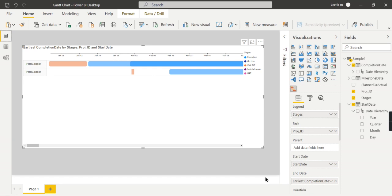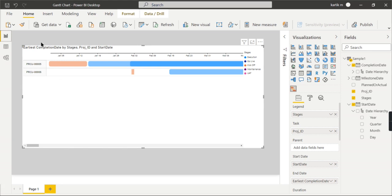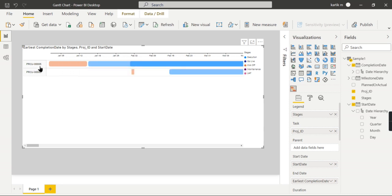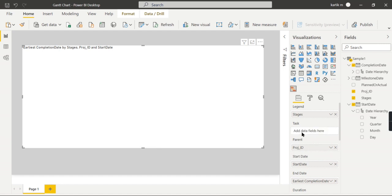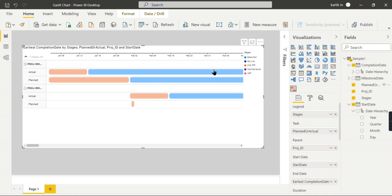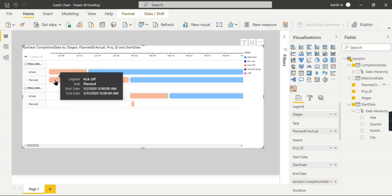But now how you are seeing it here, it comes as the earliest date. So if you want to track the project with only planned or only actual, this view is perfectly all right—what is the current state of each project. In order to view it split, like for this project what is my actual and planned, then you need to use project in the parent, and then your task should be planned or actual.